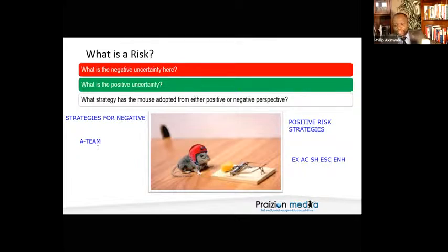So you guys know the terminology. A fallback plan is also known as a contingency plan. But it is not mitigate. Thank you, Yolanda. It is accept. So if you accept a risk, you can have the contingency plan. It's like an active accept. If the risk happens, then we will spring into action. If the risk doesn't happen, we are not doing anything.